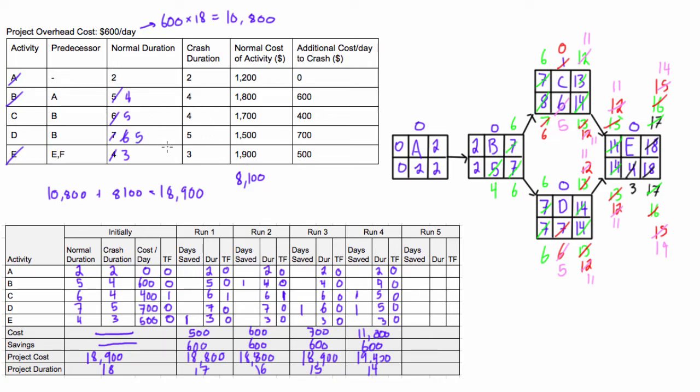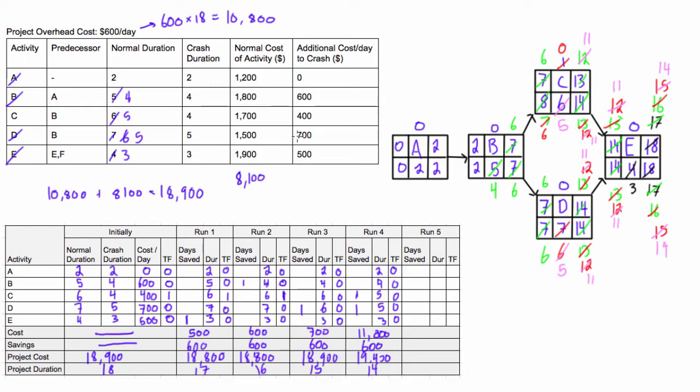All right. Well, you can see that, remember how I mentioned that we had these in parallel? And if you were to crash one of them, you wouldn't actually reduce the duration of the project? Well, we've reached the crash duration of D. We can't crash it anymore. But we still can technically crash C if we want. So I'll just show you what happens if we do that. But you'll see pretty fast that there's actually no point in doing it. So, activity C. We're going to crash this guy one last time.